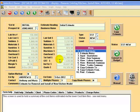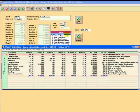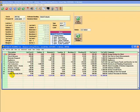If we want to drill down into the detail — menu number one — we've broken it down into functional areas in a logical sequence, starting with CAD design and check measure. We've grouped all the production materials together, all the appliances together, all the costs associated with the factory and production costs together, and the sub-trades have been grouped together as well. These phases — you can have as many as you like, you can call them whatever you want. It may well be that you break the job down into sub-jobs by area, such as for a commercial joinery job you might have the reception area as a phase and the boardroom as another phase. That way, when you win the job and the estimate becomes the job's budget, and actual costs start flowing through from the accounting transactions against the job, you'll get variance analysis by phase and percentage complete for progress claims.